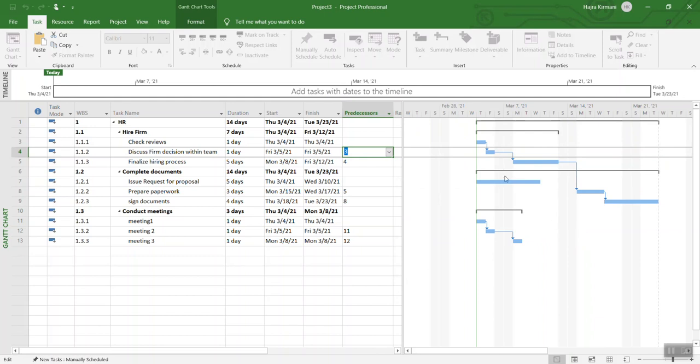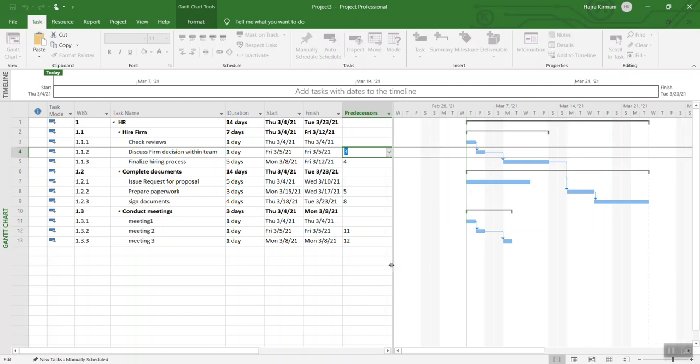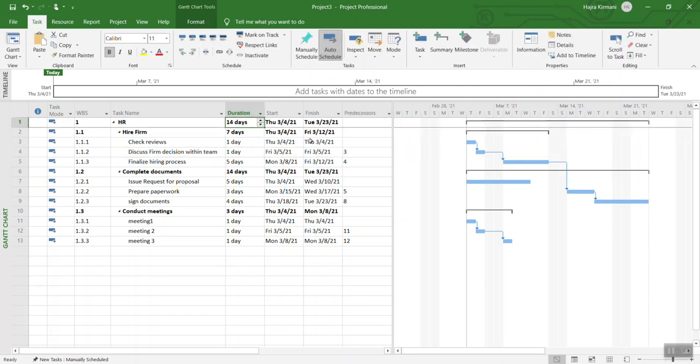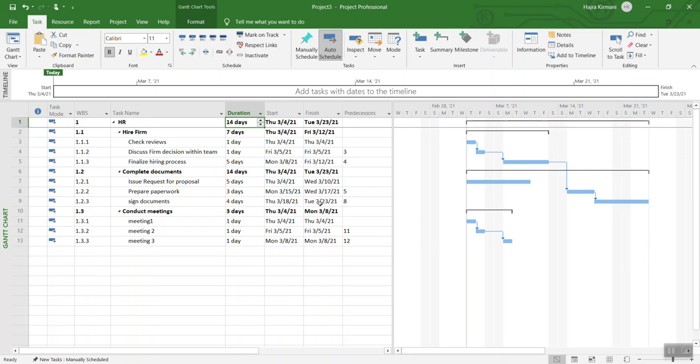If you look at the Gantt chart, we have these bars that show all the dependencies and the timeline for each. That's a great way to process your information. It's more presentable in a way, and you can easily see that this project is going to take 14 days based on all the dependencies and the work that is being done. The dependencies are listed over here and you have this WBS item numbers and all this set up in a way that is more presentable to the management.